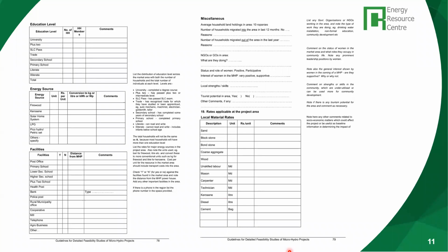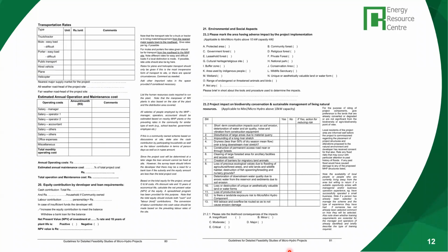What are the transportation rates? If you need to bring building materials from a nearby location, the cost of transportation is also important. Then during the operation and maintenance, what will be the approximate salary structure of the operators, the manager and other staff needed to operate this plant? So that will give you the annual operating financial model.